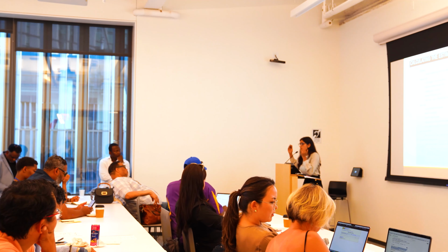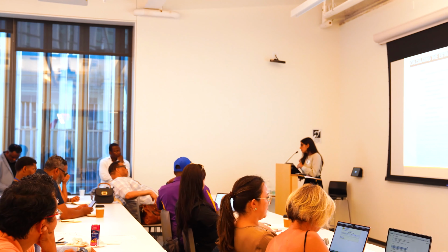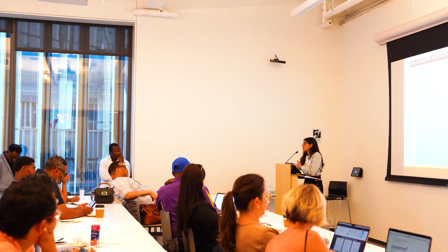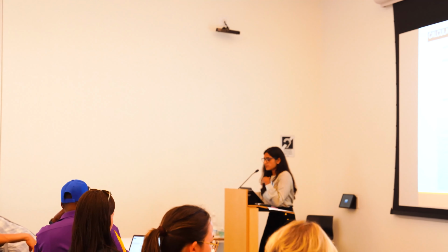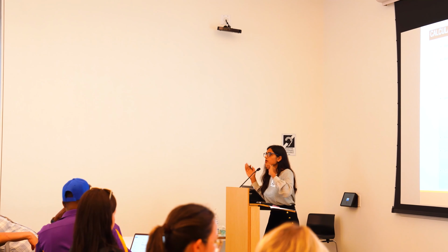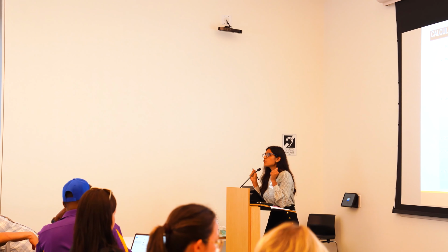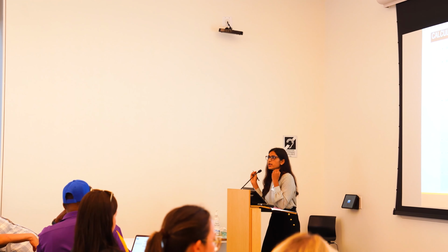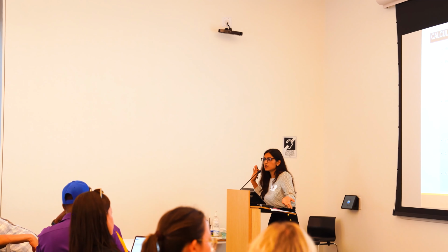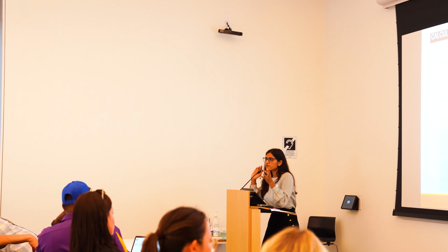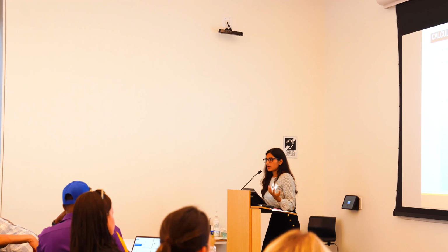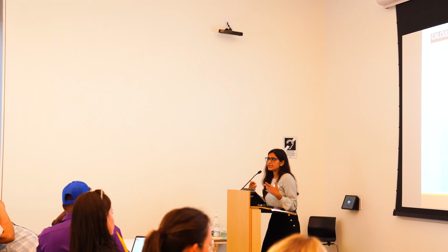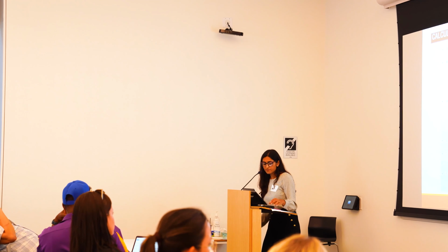And again, because at the end, when I'm done with my estimate, let's say my whole estimate came out to $100, just making a number up, I can go back and be like, okay, my division 1 was $20 a square foot and my division 22 was $30 a square foot. So I'm just trying to find any pattern that I can so that I can use this over and over again.